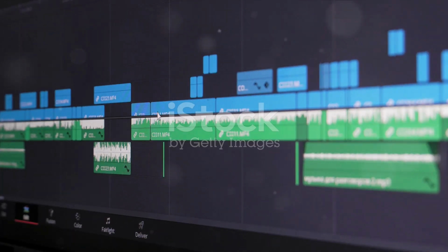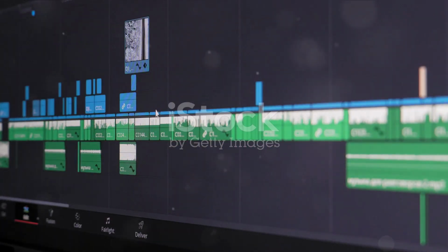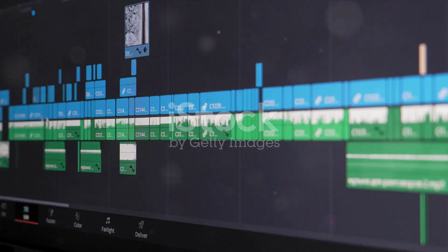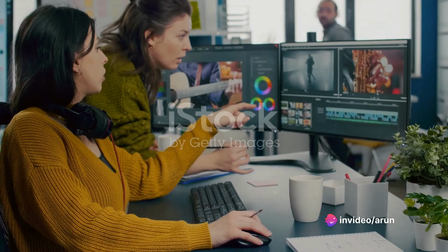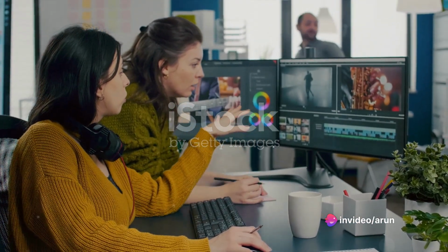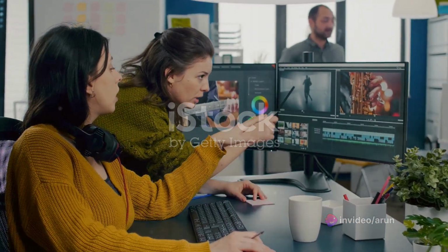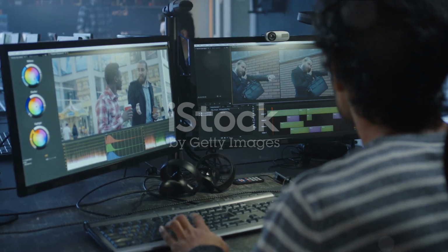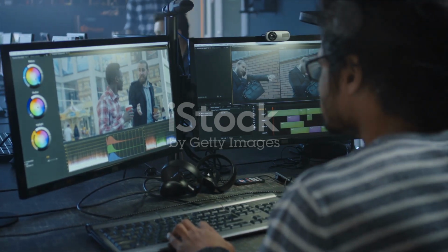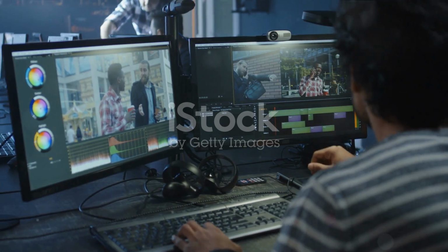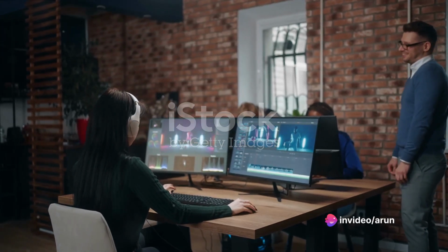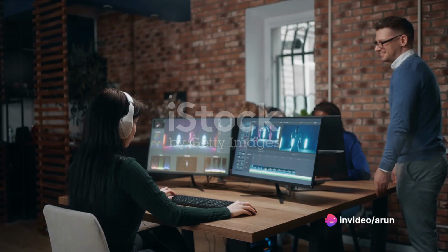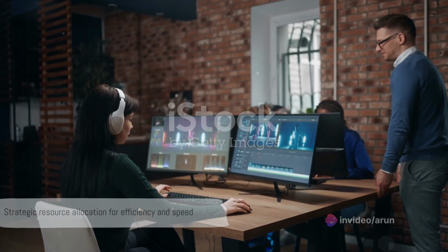Now imagine we're back in our movie production scenario. The editing process is our critical path, the bottleneck preventing us from reaching that Christmas release date. So, what do we do? We crash the schedule, we bring in 2 more editors, allocating more resources to the task, and voila, the editing time shrinks, the critical path is shortened, and our movie moves closer to being ready for its premiere. This is the essence of crashing in graph theory.